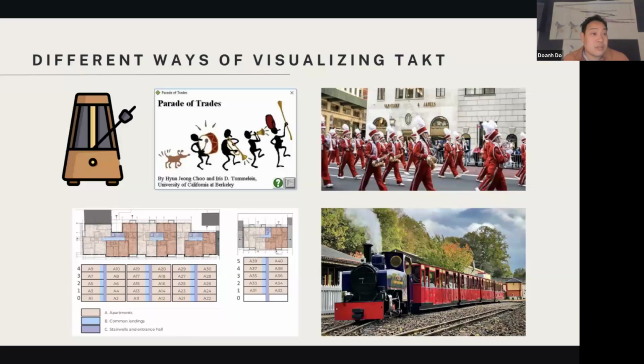They take a person, and in one day they might have 5 people on a job site. The next day they have 3 people. The next day they have one person, because they're shuffling people from project to project, right? That's a natural part of the smaller trades, because they're trying to optimize for labor utilization, because labor utilization is how they make money, right?